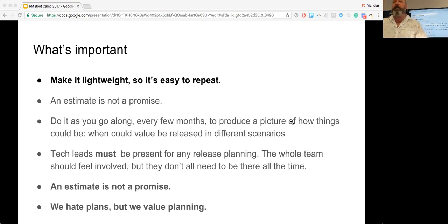And he did it on the basis that it's still a card counting method. He's quite happy to have people counting cards and even doing T-shirt sizing. He showed burn down charts and statistical looks at the project that he'd been on, which was a long-running project. And he proved that effectively you can't tell the difference between what had been happening on a points basis and what had been happening on purely counting cards. So this is the method that I went through with him, and that's the one we're going to teach today.